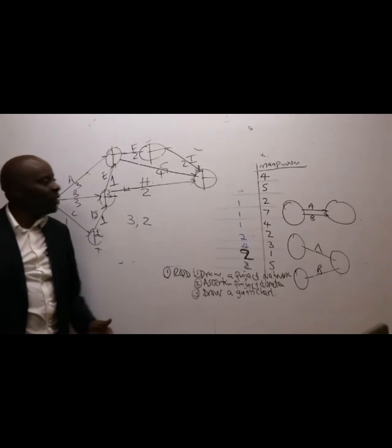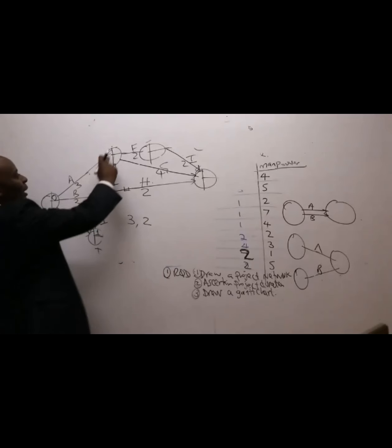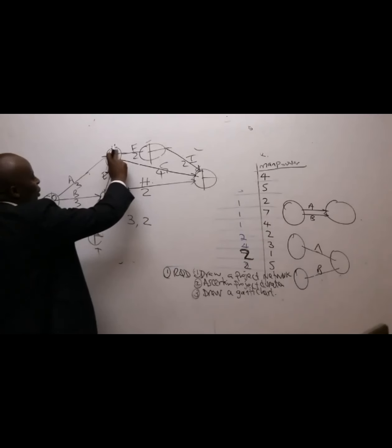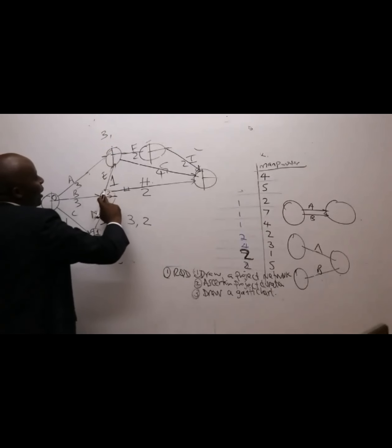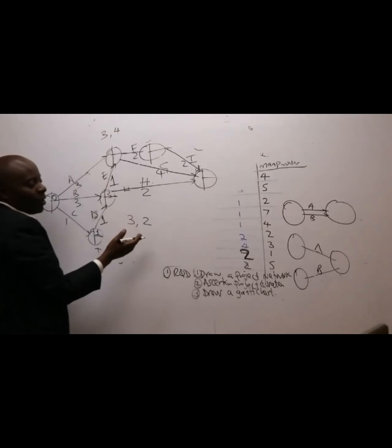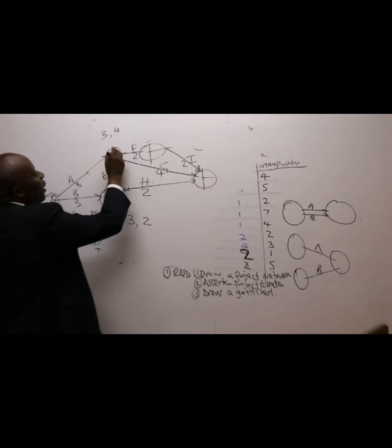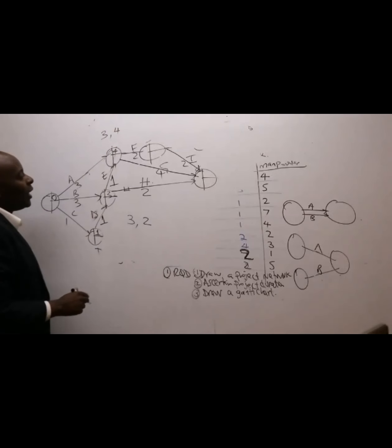Becky also tells me 4, yes, because if you look at this particular node, there are 2 possibilities. So we have A, which is 0 plus 3, that gives me 3. And then we have E, which is 3 plus 1, which gives me what figure? 4. So it's forward pass, so straight away the higher.